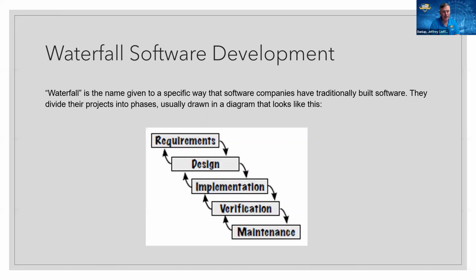And it's a given way of developing our systems. We start with the requirements, JSITS process. We start with our design. This is milestone A. This is maturation, technology, risk reduction, all this other stuff. We start implementation. We get a contractor on board and we have them start building it for us. And then we do some testing and verify that they built it right during operational test. We give it to the user and we maintain it. That is our DoD acquisition process of the past, and that's sort of the culture that we are in today. So we need to have a cultural change if we need to get out of that.